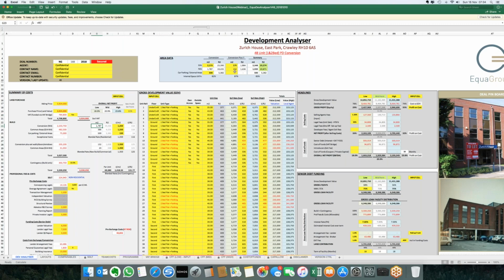And we've got 152 square meters. This is the residential accommodation bit, and then we've got 175 in total. So this is the whole area, including corridors. So that leaves then the NIA for the rest of the site, which is 1,787, with a GIA of 2,173. So the 2,173 includes the residential area, the corridors, lift lobbies, entrance halls, etc. It's the whole building.